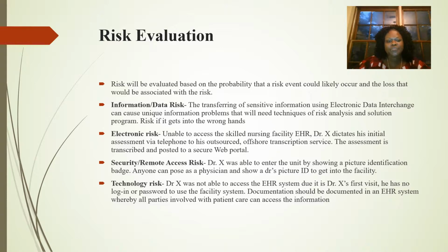Risk evaluation. Risk will be evaluated based on the probability that a risk event could likely occur and the loss that would be associated with the risk. Like I said, in the scenario that we were presented, there were a couple of risks that we can draw. Information data risk: the transferring of sensitive information using electronic data interchange can cause unique information problems that will need techniques of risk analysis and a solution program.